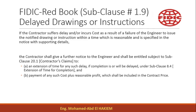The contractor shall be entitled, subject to subclause 20.1 (Contractors' Claims): A. An extension of time for any such delay, if completion is or will be delayed, under subclause 8.4 – Extension of Time for Completion; and B. Payment of any such cost plus reasonable profit, which shall be included in the contract price.